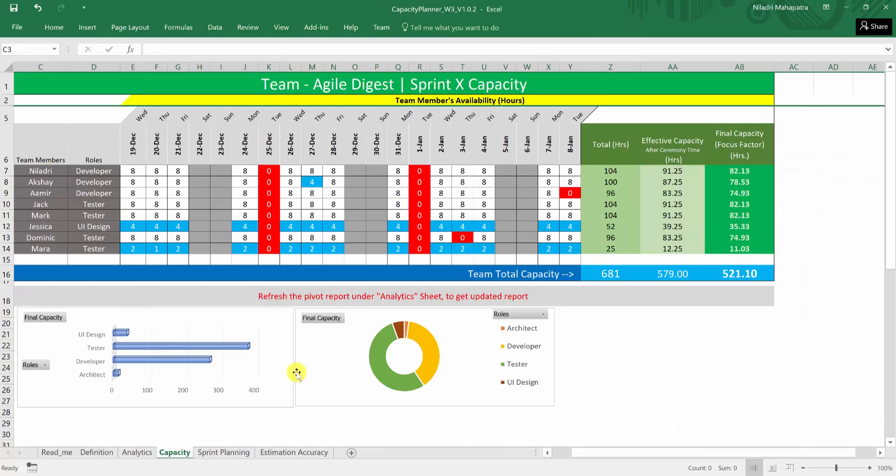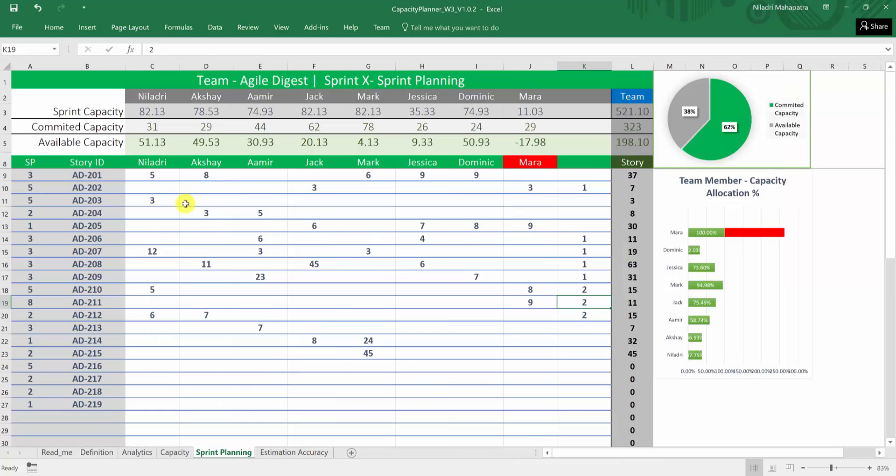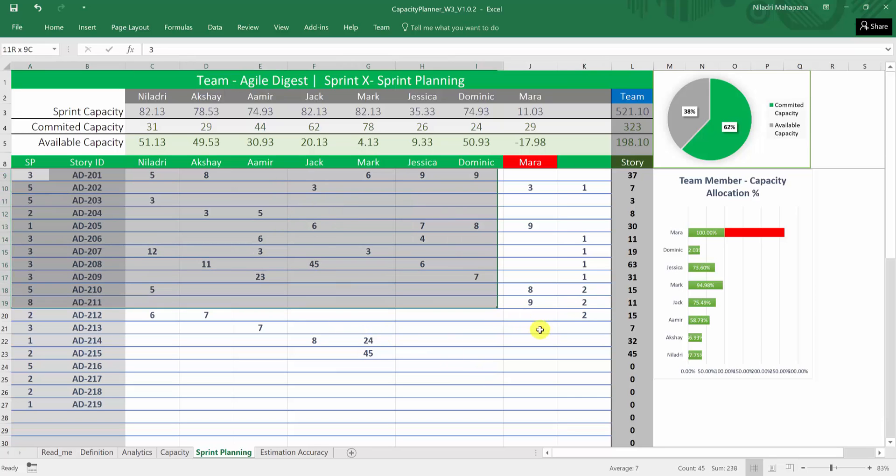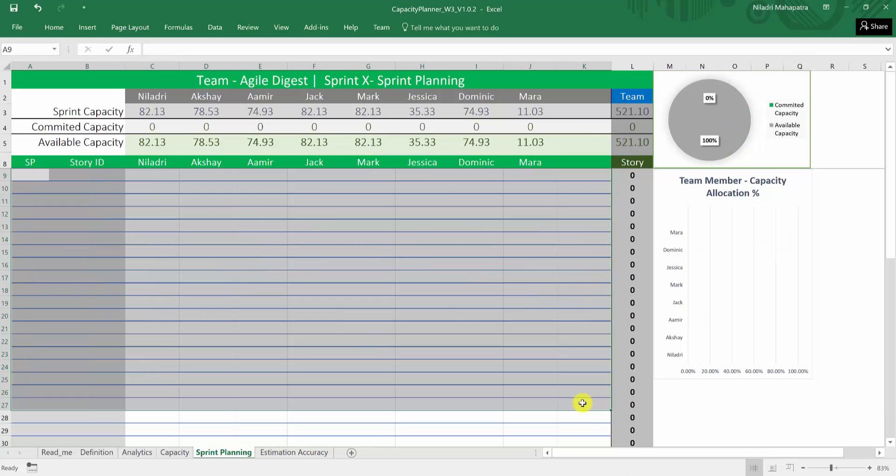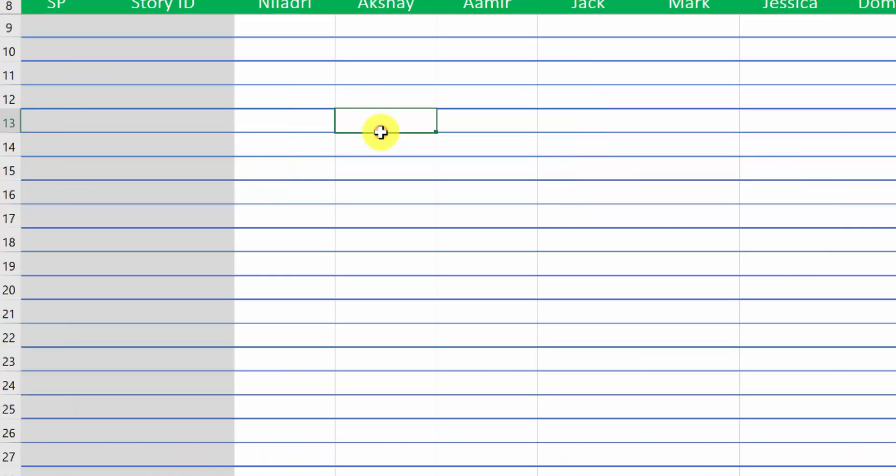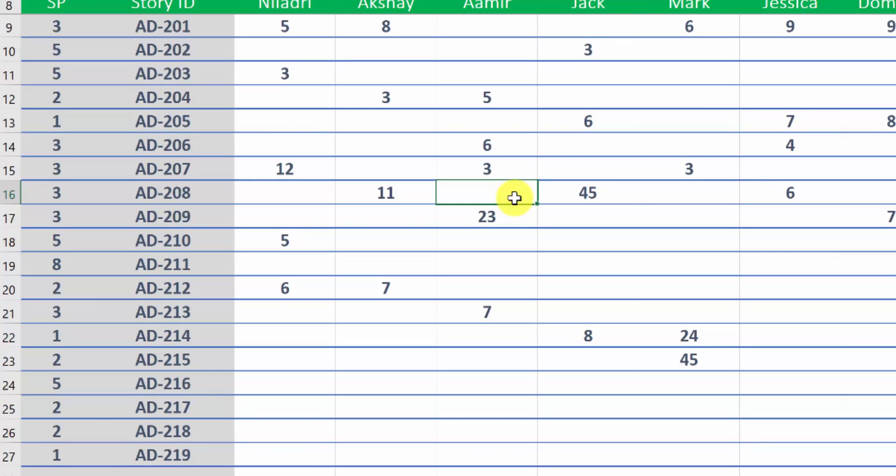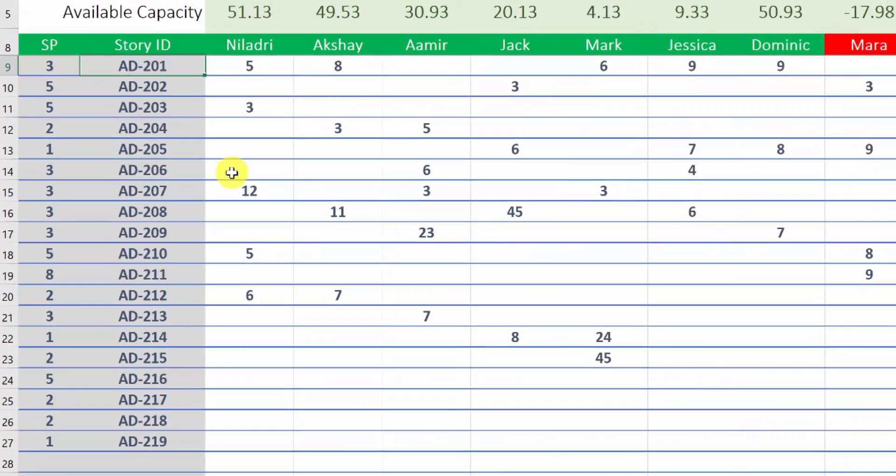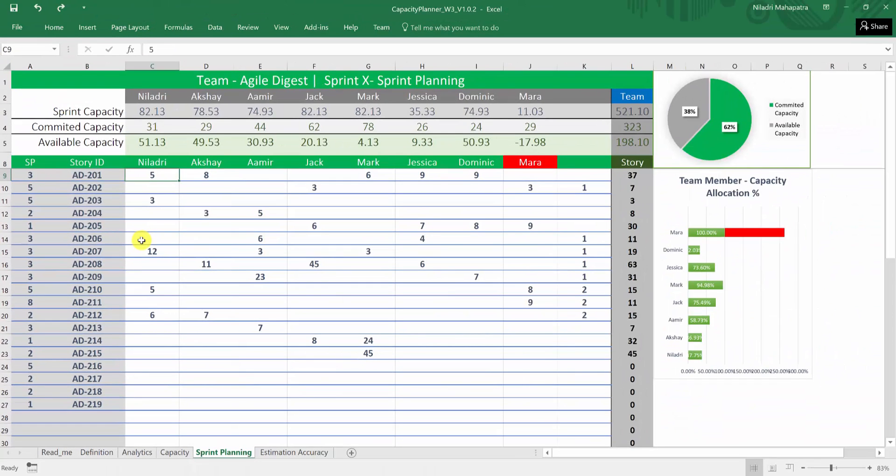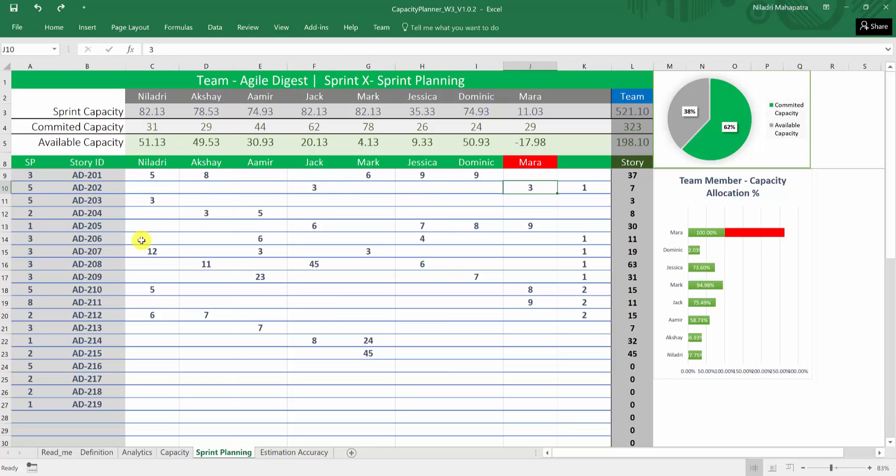Now once your capacity is planned now you know what's your capacity is and you will be going for a sprint planning to do a sprint planning you need to know how many capacity each one have with their role and what are the stories coming up. So there is another seats you will be having some sample data along with that this data is there to make you understand once you will be starting it you will be clearing it off up to this area by just simply select and delete it will be all blank. Once you will be start filling it you will be see you will be entering some data and for an example I will just do a control z to get the data back and here each rows you are just entering the story points of the stories that you are committing and the task hours you are distributing within your team member. Here all these stories have some tasks associated and those tasks will be working by someone else.